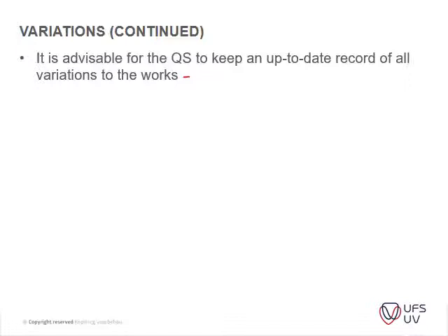Then it hasn't been calculated, or it is justified and everyone agrees that the contractor should be paid for it, but then it pushes the project over budget. That's basically the two risks with variation orders.